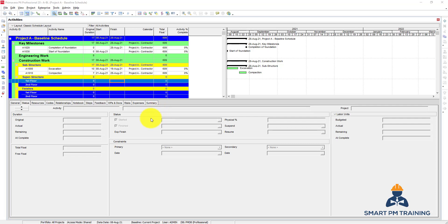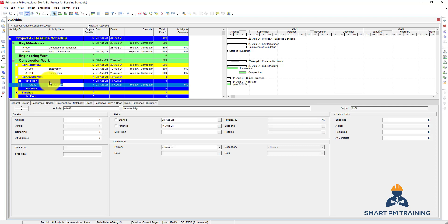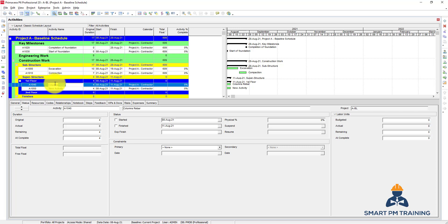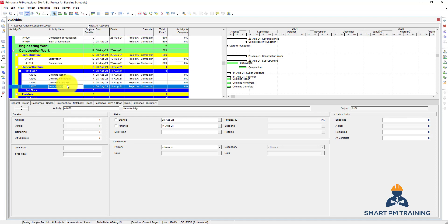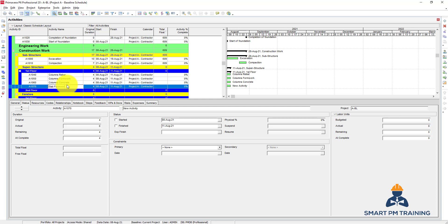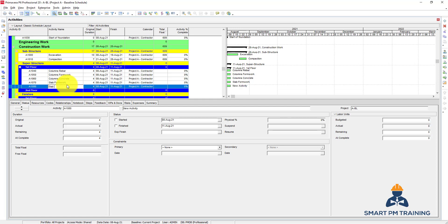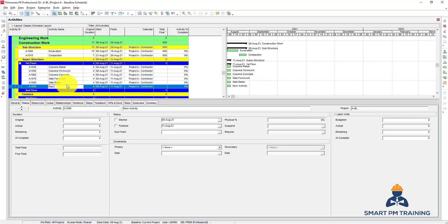In this video we will explain how to copy activities and relationships in Primavera. So if I have the superstructure - first floor - I will click Insert from my keyboard and add the columns: rebar, columns-formwork, and columns-concrete. After that, slab-formwork, slab-rebar, and slab-concrete.